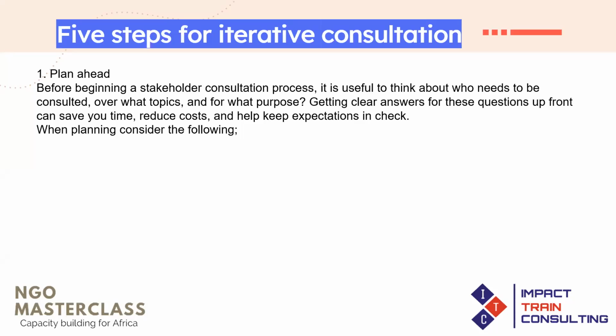In order for you to consult, the first thing you need to do is plan ahead. Early on in the project, you need to think about who the people are that we're going to be consulting with, what we are going to be consulting with them about, and why we are consulting with them. It's very important that you know this so that you can manage costs and also manage stakeholder expectations. So it's critical that you plan ahead.